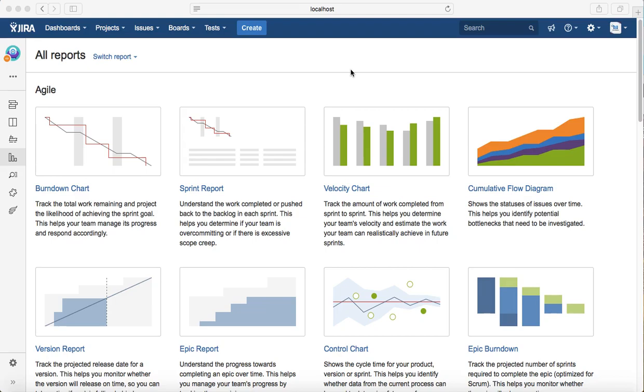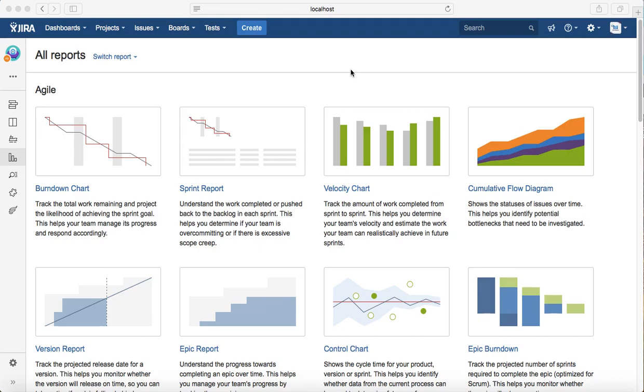As you know, in agile development methodology you plan your work within the sprint, which is a time-boxed two to four week cycle. Based on whatever you have planned, you put that in that particular sprint and then track the progress of how tasks are being progressed day by day. The burndown chart allows you to see the progress based on story points or time remaining to achieve those tasks.